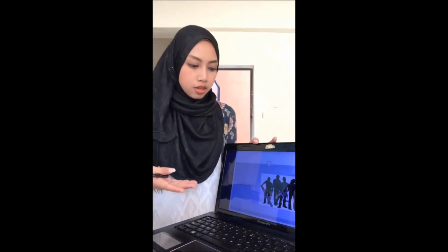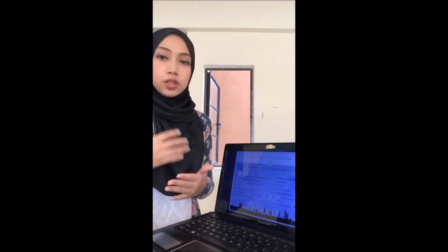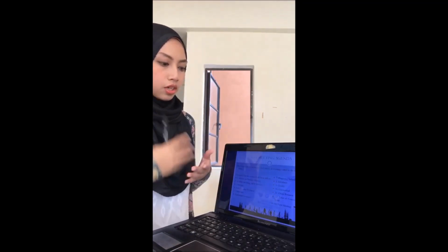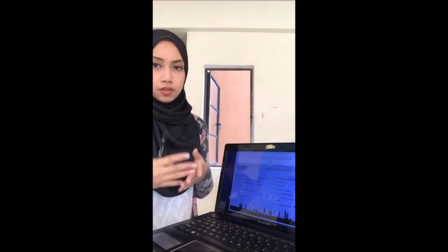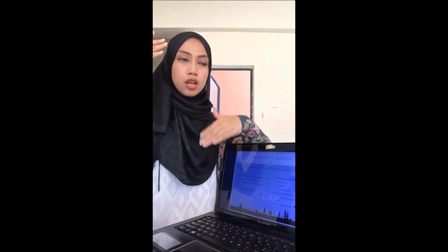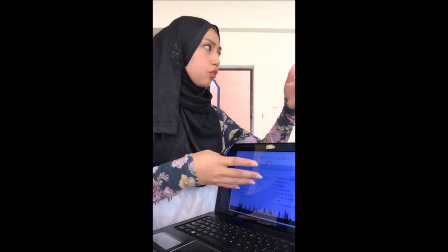Alright, so the next one: these are the submitted agenda that will be faced by the contractor and the designers, the consultant. The contractor shall attend all the meetings called by the representative officer. The first agenda item is the minutes of the previous meeting. They will be recalling the minutes of the previous meeting, the one that they had before this one. And then the second one is the safety meeting including the safety statistics. So the contractor will show everything very openly and transparently to the consultant.